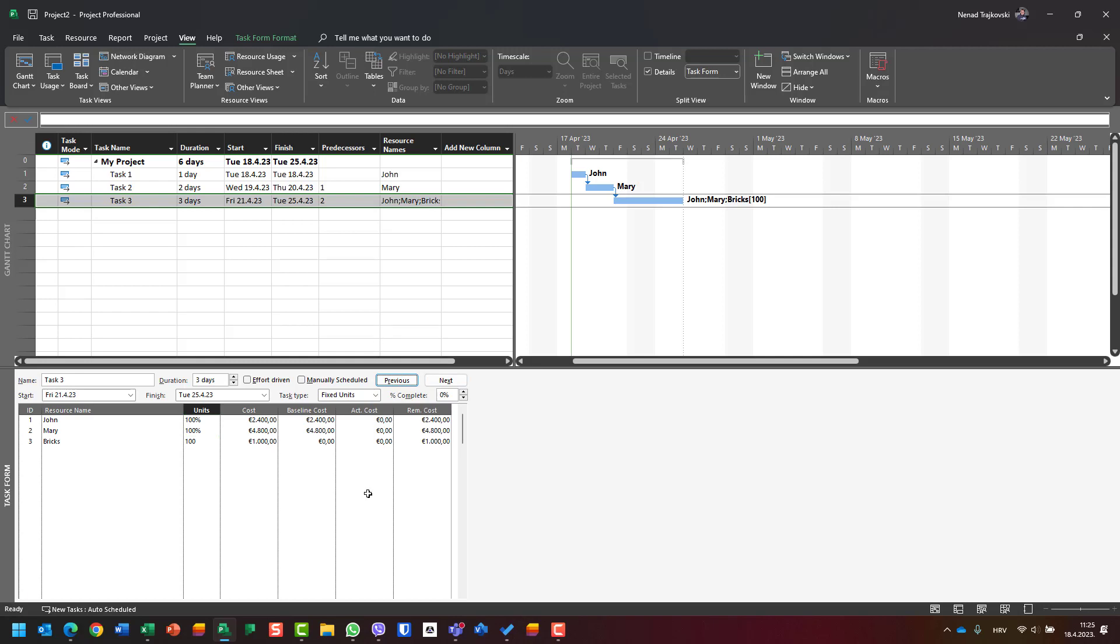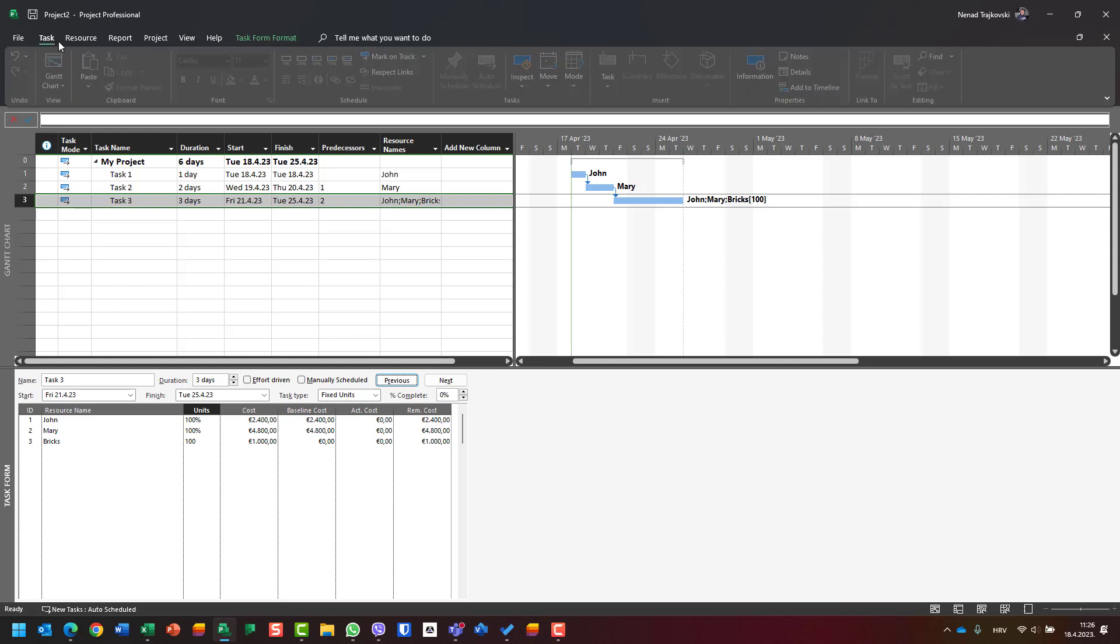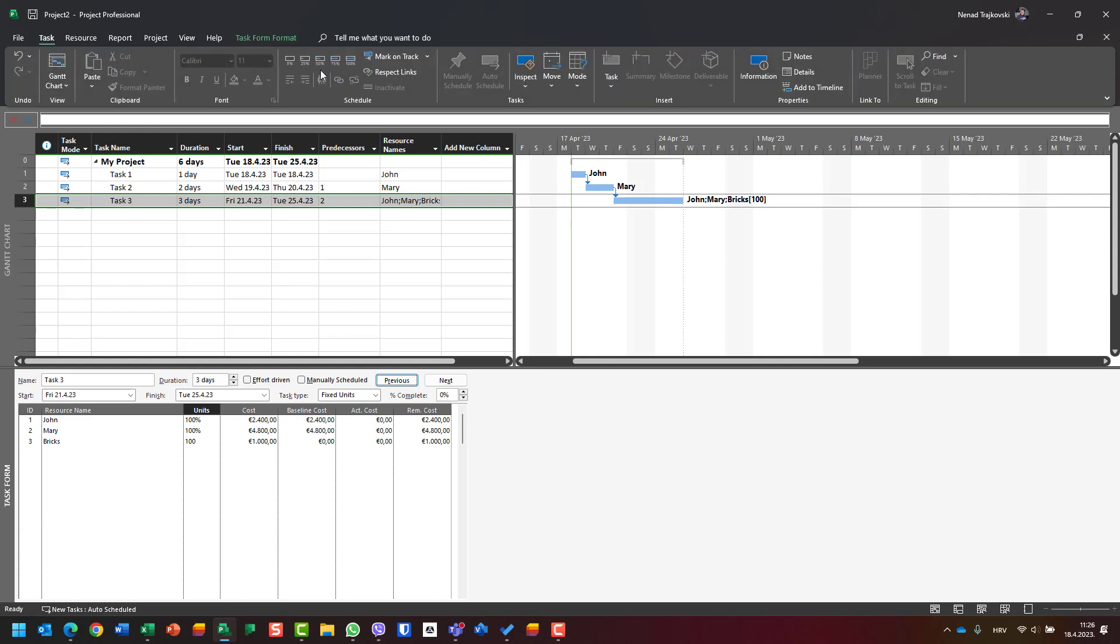To see the whole costs, I should calculate: 2400 plus 4800 is 7200, plus the bricks is 8200, which is not so convenient. Let's say Task 3 is 54 percent done - it doesn't make sense that it's done before Task 1 and Task 2, but just for the example's purpose.